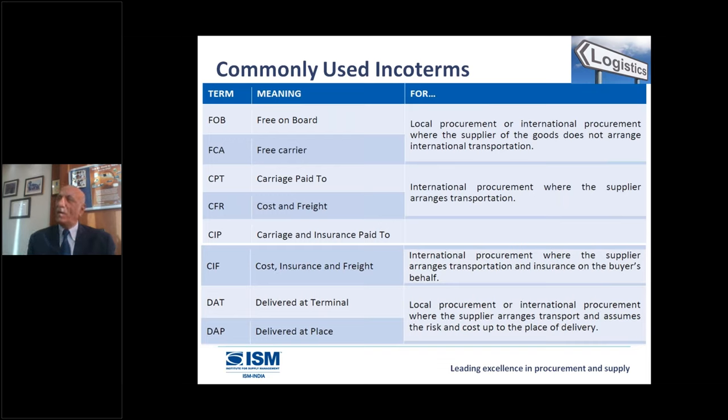Forwarding agent, certainly all of us use it when it comes to customs clearances. Forwarding agent, also we use it. I've got a small packet to be sent. I don't have a container load. I don't have a truck load. I give it to the freight forwarders. They combine together, they consolidate and try to get the best rate for me for shipment. So forwarding agents play a key role from that angle. Even the shipment container has to be sent to other places. You can take the help of forwarding agents, take care of shipment, take care of insurance, whichever you want.